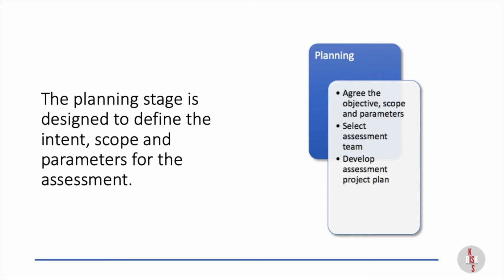What's the scope and the parameters? So are we trying to answer a specific question? Are we trying to create a baseline assessment? Are we looking at the whole organization, just part of the organization? And then the parameters, like how much time do we have? Is there a budget? And that leads into the team. Is there a team available? And if so, we need to select the assessment team. Who's going to be working on this with us?